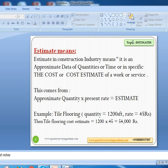For example, I am taking tile flooring. Assume the quantity we have got for tile flooring is 1,200 square feet, and the rate is 45 rupees, which includes material, manpower, and all required tools and machinery. According to our formula, quantity 1,200 into rate 45 gives the amount 54,000 rupees. This is the estimate.